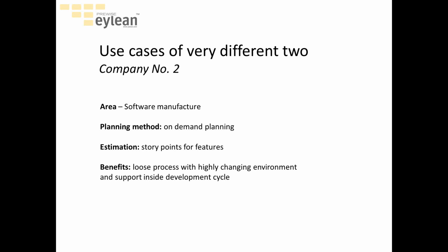And of course, they're using story points just to measure the size of a task and just to predict, because they know the speed of a team. They can even sum up different employees, and they can provide the speed of the team. It's the same as a car. If you go 60 miles per hour, you can push a little bit to make it 70. This is the same in the team. If it goes like 50 miles per hour, it can be pushed a little bit next week for, I don't know, a special release. So they can push themselves and provide like 70 story points instead of 50. So this is actually the speed of a team.